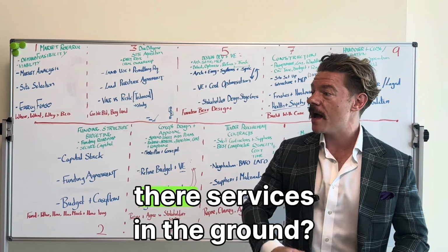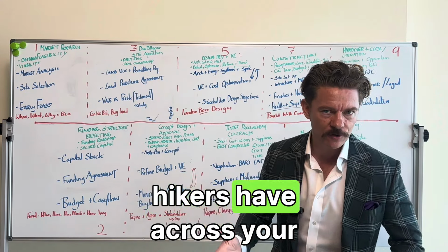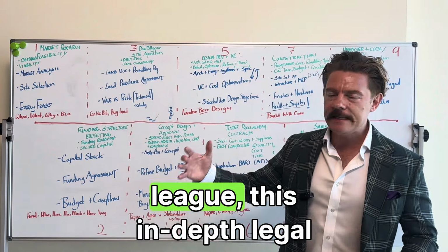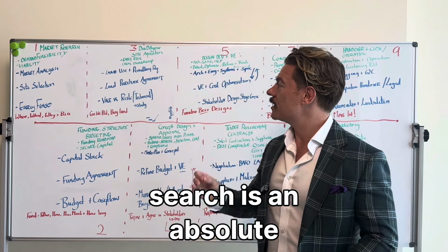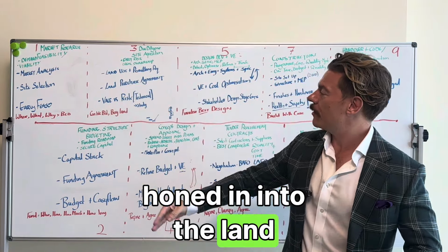So that's why before purchasing, you want to be doing as much due diligence in terms of the technical risk for the site. Are there services in the ground? Are there easements? Are there rights of way that hikers have across your land? Really doing this in-depth legal search is an absolute priority here. And all of this will be honed into the land purchase agreement.